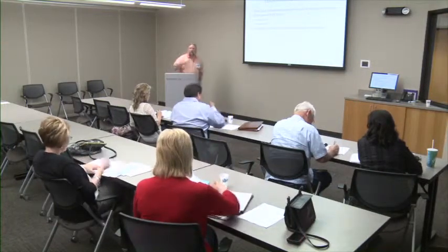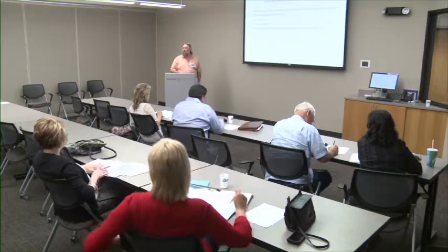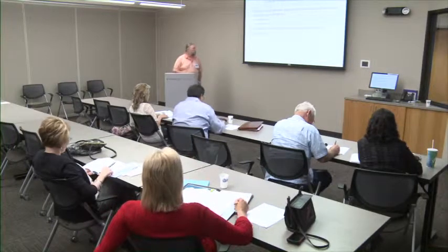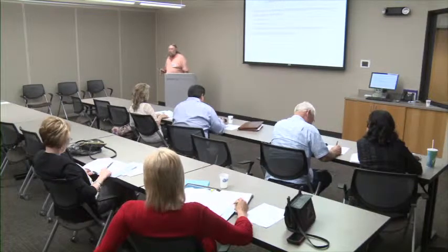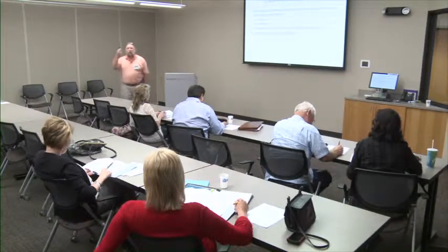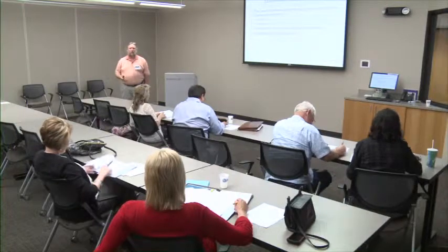So there's going to be greater detail in this section, right? Because we need to control it better. Greater detail, but there may be a limited number of activities because we're not looking at the 100 activities that we're dealing with. In this 2-week period, there may only be 3 activities going on. So we're looking at a small piece of the activity, but we're looking at it in greater detail.